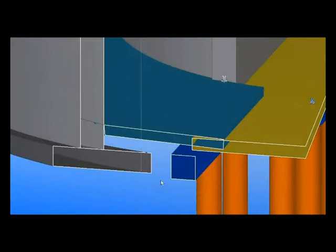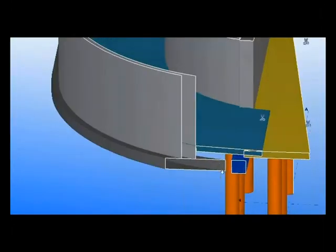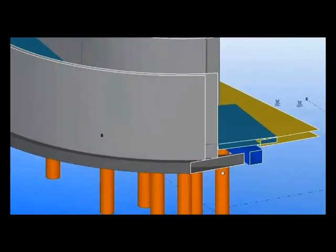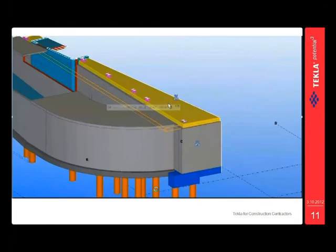You're going to be building it, so you might as well start looking at these things quite early and build your pricing around what you can see there in your scheduling. Better to come across these things early than later. Better to get them in your bid now, so that you don't bid too low and find out later the reason why you're so low is because you forgot something or you missed something.